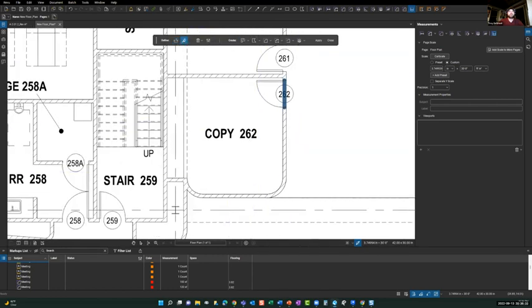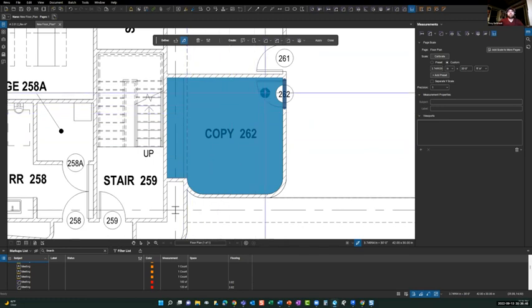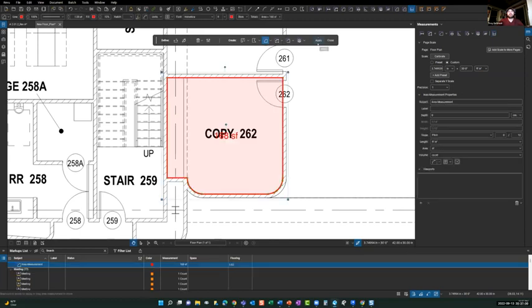Then I'm going to select my paint bucket. And I just come into the area I want to measure, hold down my left mouse button, and just let the paint fill the room. I'm going to bleed through that cabinet, bleed through the door tag. And I need to tell it what to report. If I don't select any of these, I'm going to hit apply and it's just going to cancel because I didn't tell it what I wanted to know. I'm going to put area in here and I'm going to hit apply. And then that's going to give me my area measurement. Drag that. Call this one meeting, even though it's not.